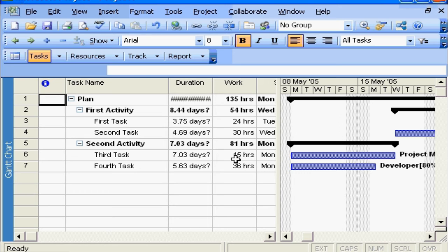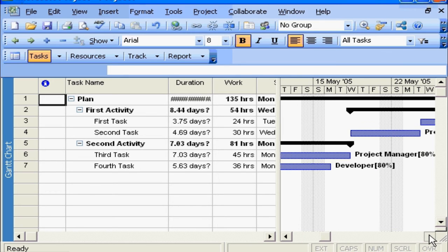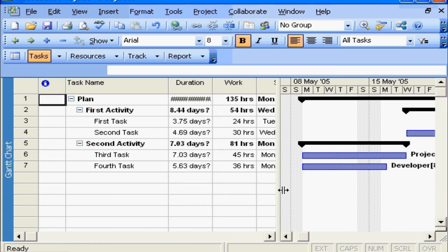So therefore, I'm going to schedule that first, get it out of the way, so we can go on and do other project tasks. And then I'm going to look for your next hardest piece of work, which is this one at 30 hours, and then finally the remaining task at 24 hours. So that's why it did this rather unique approach to scheduling. And it did the same for our developer, where the developer only had the single task, so it simply allowed the developer to start working on that first task right away on our project.